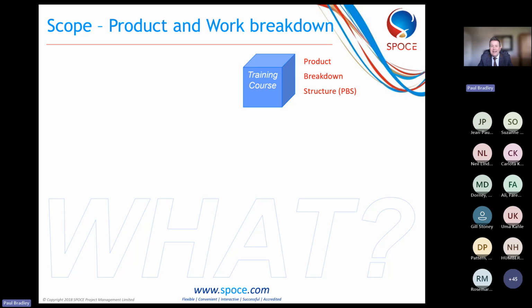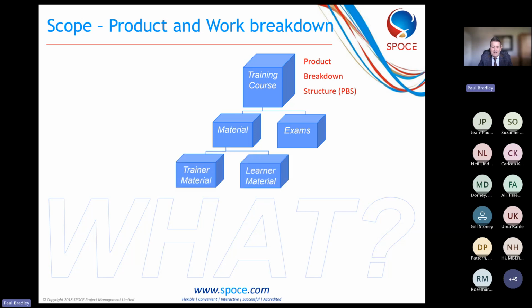So what makes up our training courses? Well, we've got training material and we've got exams. Add them together, you've got a training course. If I start breaking down the training material further, I've got trainer material, i.e. my material, and we've got learner material for you guys. And I can break that down even further if I want.